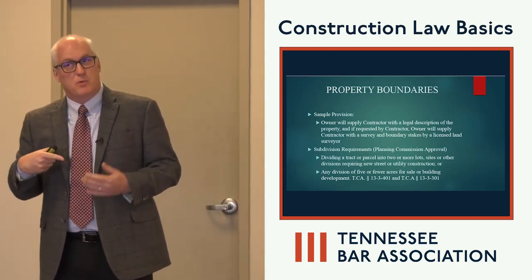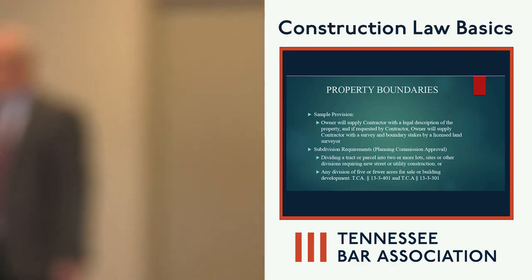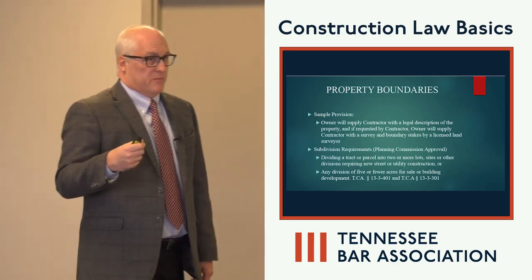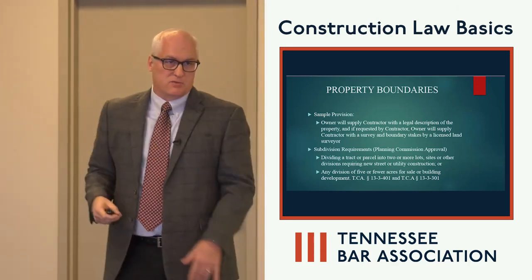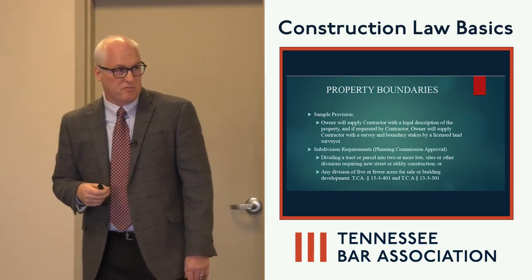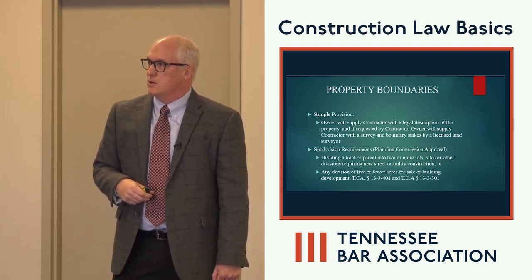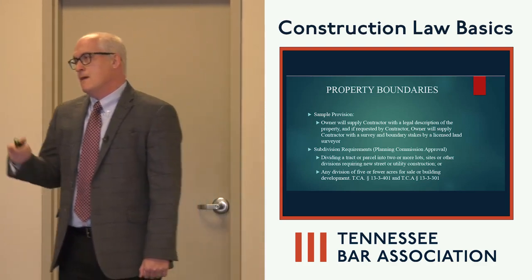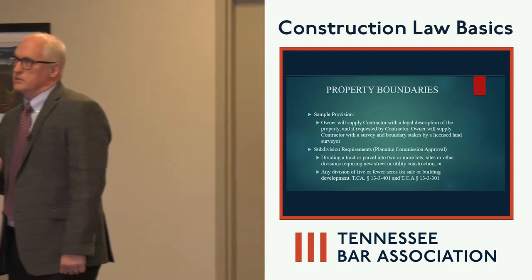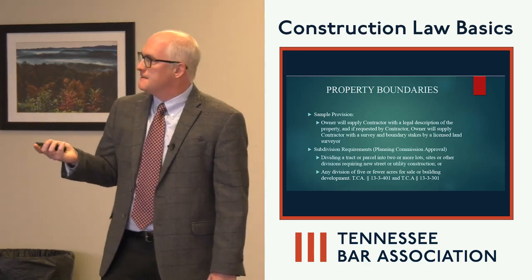I had this issue come up with a contractor client last year, as a matter of fact. Same scenario, mom and dad were giving their son some property. Well, come to find out, they planned to use the same access road for the main house. They couldn't get it through the planning commission because they didn't have the road frontage for the 2-acre carve out that they were trying to do. So again, something to keep in the back of your mind if you represent contractors, that this may or may not be an issue if you get out in the more rural areas.